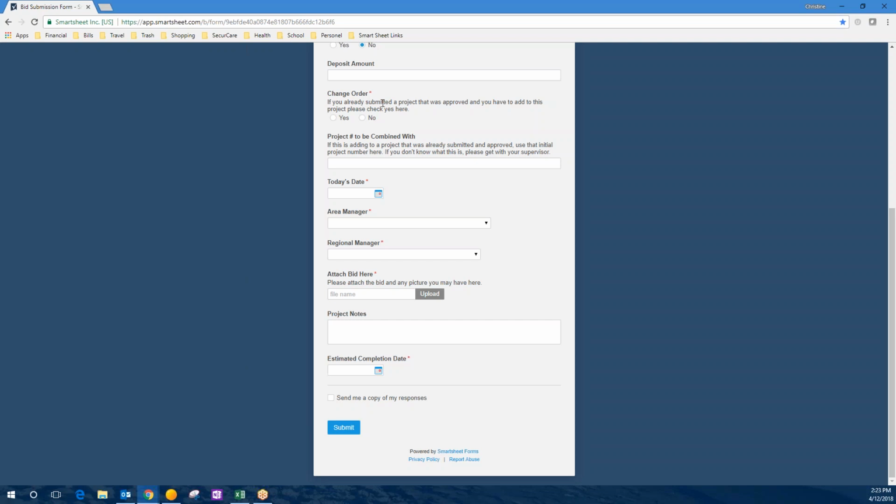And that will need to be able to be combined with the project that you'd already submitted. Your supervisors will have the list of all the project numbers that were originally submitted. Every time you submit a bid, a project number gets assigned to it. So we want to make sure we can link the change order up with the already approved bid that you had already put in there to be approved.